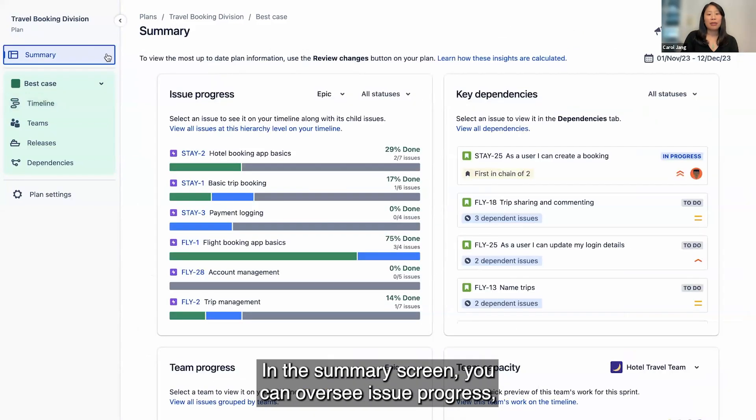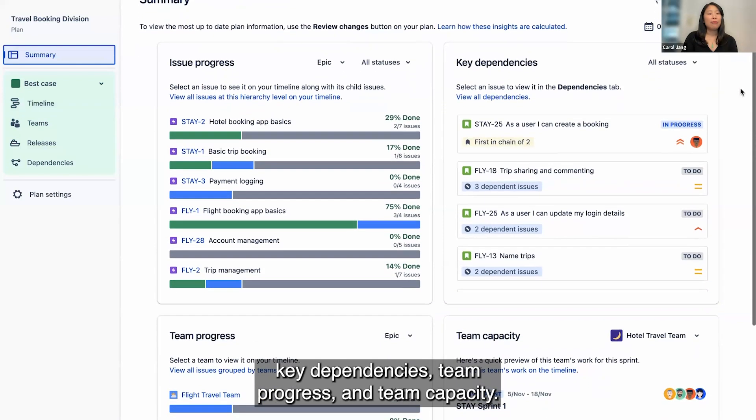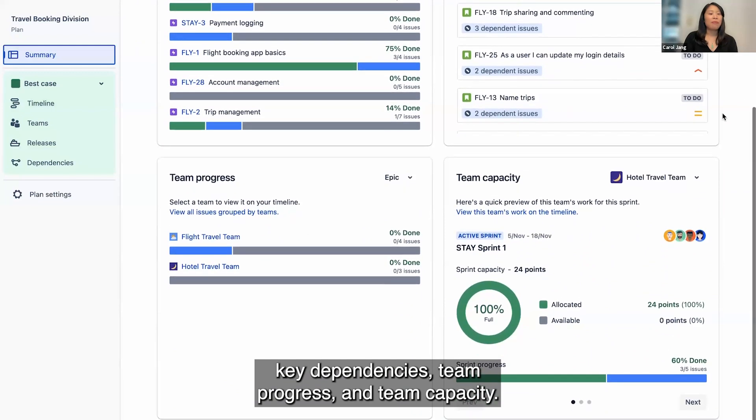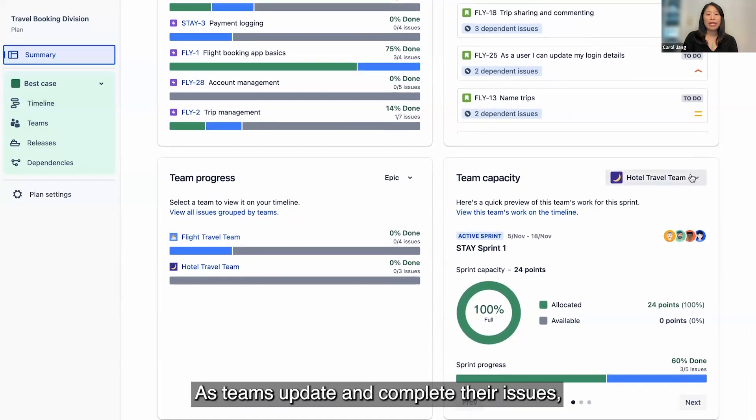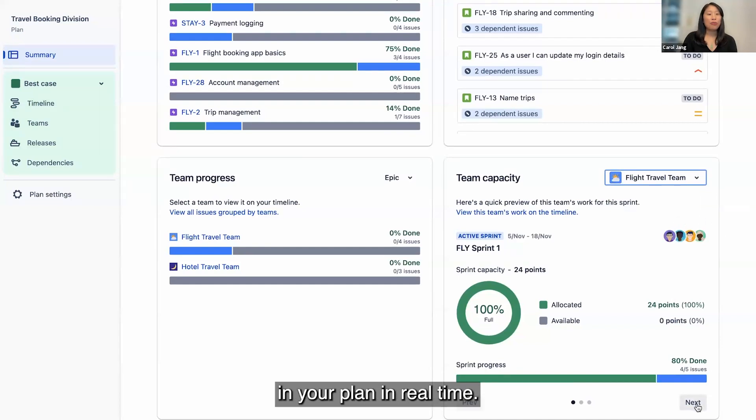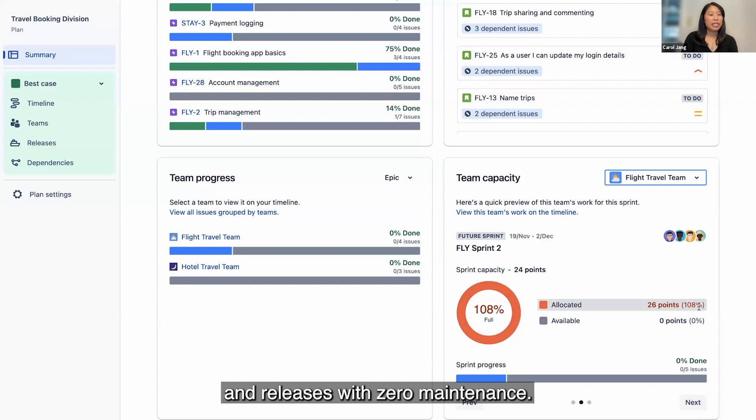In the Summary screen, you can oversee issue progress, key dependencies, team progress, and team capacity. As teams update and complete their issues, these changes will automatically be reflected in your plan in real time. This allows you to track the status of issues and releases with zero maintenance.